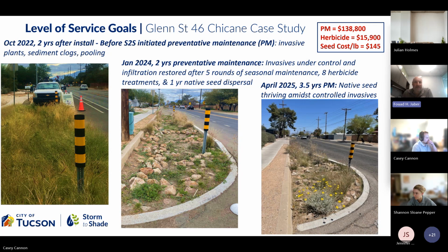Of course, it all depends on how you do it. If you go the regular way and pay a consultant to do the design, and then it goes to different groups, the cost increases. But sometimes it's just a bobcat, bringing soil and plants, and a few volunteers, and it can reduce the cost by at least 50%.